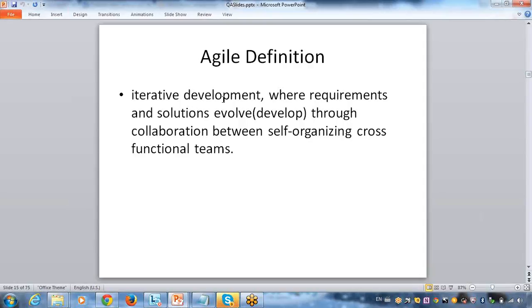You will say, yes, I'm developing my login page. How do you want the login page? You can give your inputs, and they will develop the application. Once they are done with the login page, they will give it to the testers, and the testers start testing the application. By that time, developers will develop one more module like search functionality, and then give it to the testers. By the time you have completed your login testing, you will give the login feedback to the developer, and they will start working on it while you complete your search. So at the end of the day, you can complete and deliver your projects very quickly.